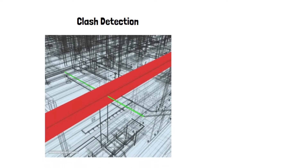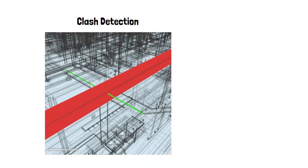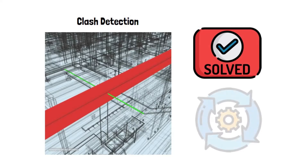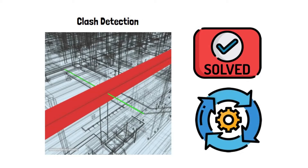Clash Detection: The structural, architectural, mechanical, electrical, and plumbing projects are incorporated into one shared model. Clashes are identified in the early stages of the project and resolved before actual construction starts. By doing so, construction teams can work more effectively and unexpected cost increases and time delays can be mitigated.